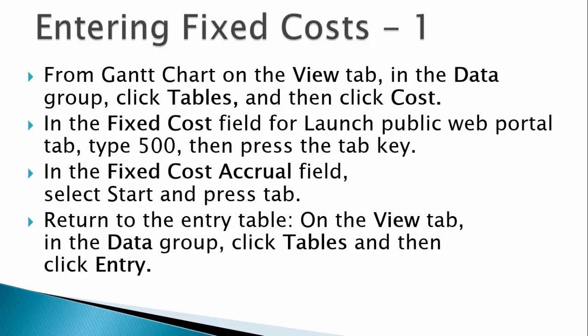The accrual field allows us to choose when to apply the fee, at the start of the task, in even amounts throughout the task, or at the end of the task. In this example, we need to pay the fee up front, so we will choose Start.